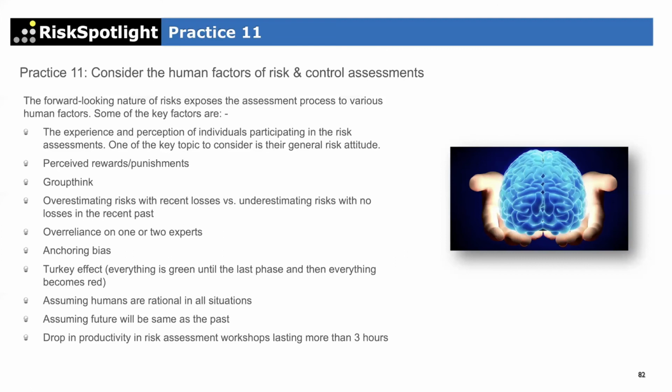You just assume that everything has stayed the same, which in some cases may be okay, but you want to be aware that that may not always be the case, especially if you're working in things like money laundering, or you're working in fraud where things are changing very quickly, and particularly in cyber, where the cyber risks we have today are very different to the cyber risks we had 5 years ago, both in terms of the nature and the severity. And if you're running any workshops, make sure those workshops are not more than 3 hours, because the effectiveness of those workshops will drop if they're more than 3 hours.